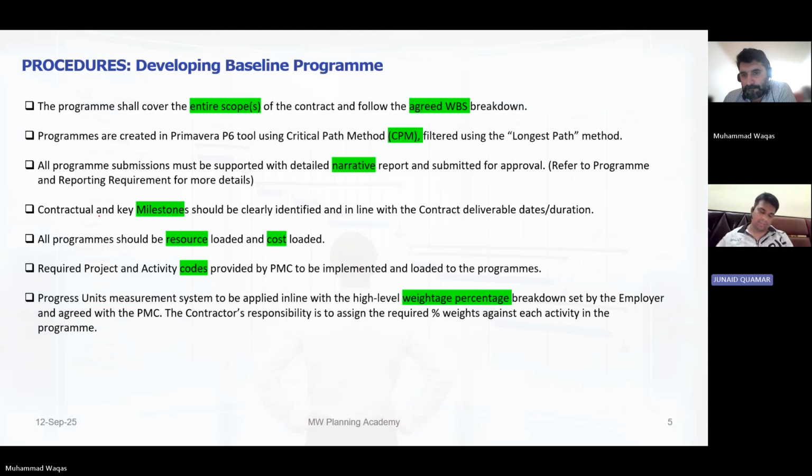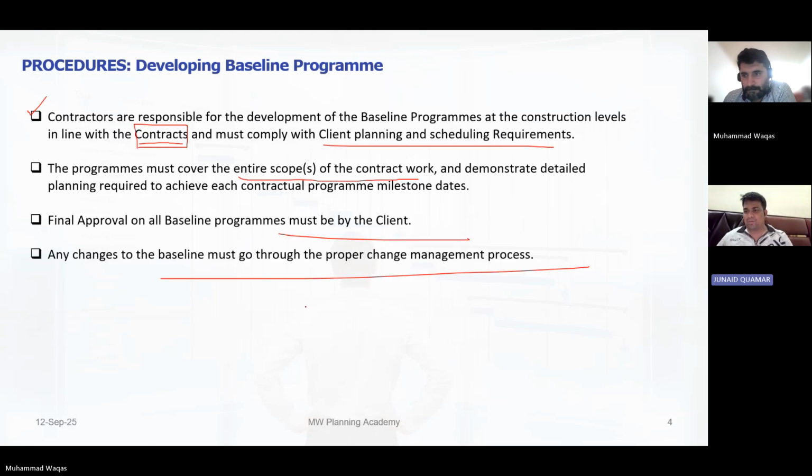This is also applied for a condition where we have change of a specification or change of the government rule regarding some kind of a specification or IEEE new update. Based on that, we will have to change the activity, and this will also impact our baseline. Baseline 2, baseline 3, we have to revise. Yeah, exactly. So any change can happen.